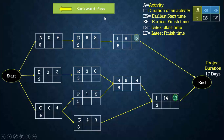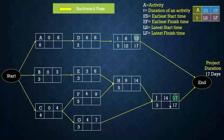Now we will perform the backward pass to find the latest start time and latest finish time of individual activities. Activities I and J are the tail activities with no succeeding activities. The latest finish time of activity I is the total project duration, which is 17, and the latest start time of I is 17 minus 5, which is 12. For activity J, the latest finish time is 17 and the latest start time is 17 minus 3, which is 14.